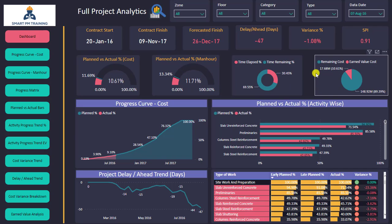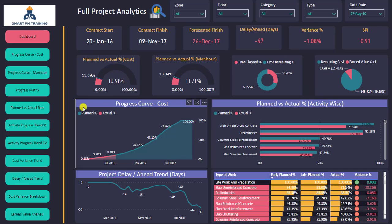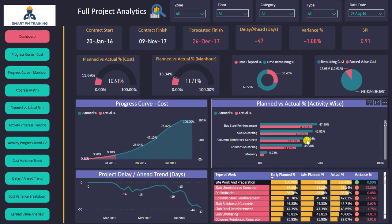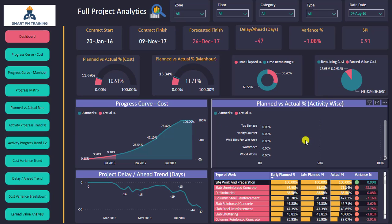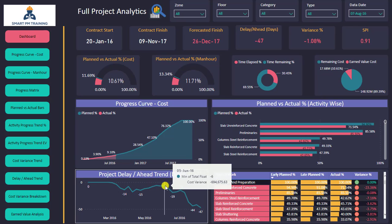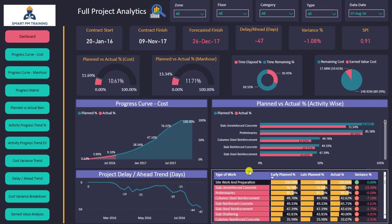I also have the remaining cost and earned value cost. This is an overview of the progress curve based on cost, and I have the planned versus actual percentages. I can scroll down to see all activities in my project. Here I have the trend of project delays — during one period I had no delays, then delays remained stable, then more significant delays over time.